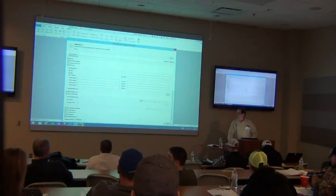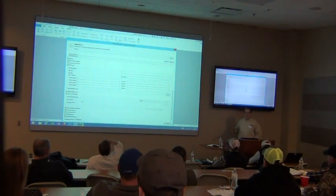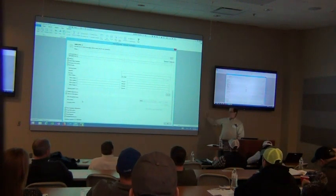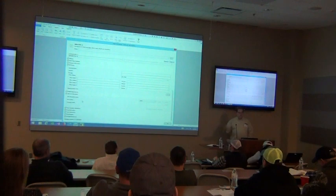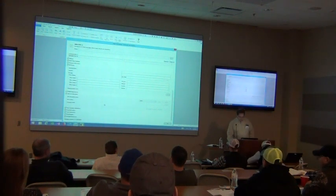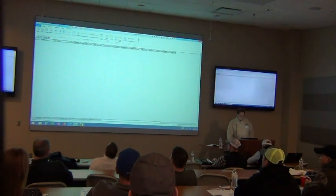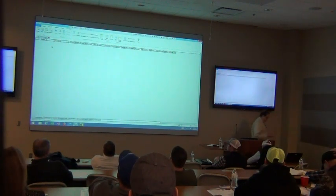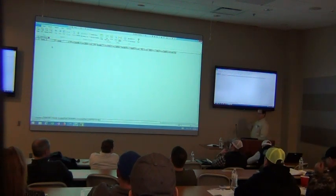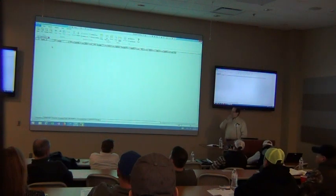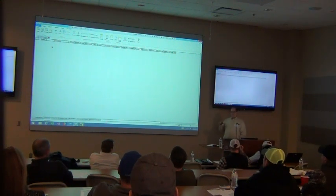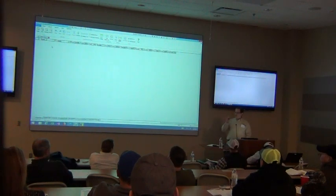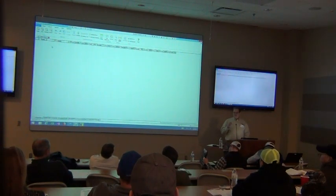One of the nice things about many estimating systems over spreadsheets is the ability to transfer estimated budgets into some sort of job cost system, so you can track estimating versus actuals if you're awarded the job. Kevin is going to start off by putting some information into the spreadsheet first, then come back and talk about better ways of organizing it.